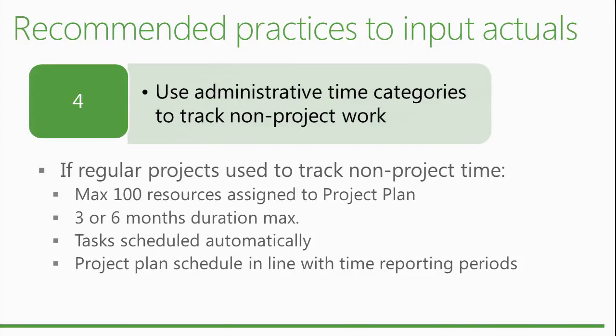So what's happening when you do that, every resource that is assigned to the task is going to generate a lot of records over a very long period of time that is going to make your reporting database grow a lot, basically, because the data in the published database is stored time-phased. So it's going to basically expand the size of the tables in an unexpected way if you do that type of thing.